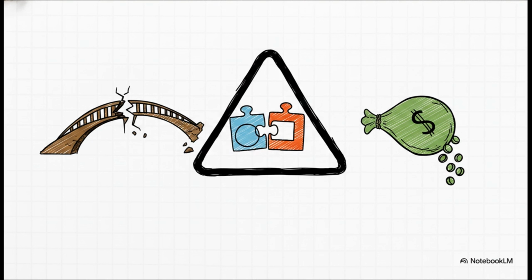But before he goes, Dr. Rao leaves them with a few critical warning alerts. The most common mistakes in the industry include jumping to litigation way too early, trying to use mediation to solve a purely technical defect, or forcing expert determination onto a relationship conflict. Misdiagnosing the dispute distorts the entire resolution process, destroys trust, and inflates costs tremendously.